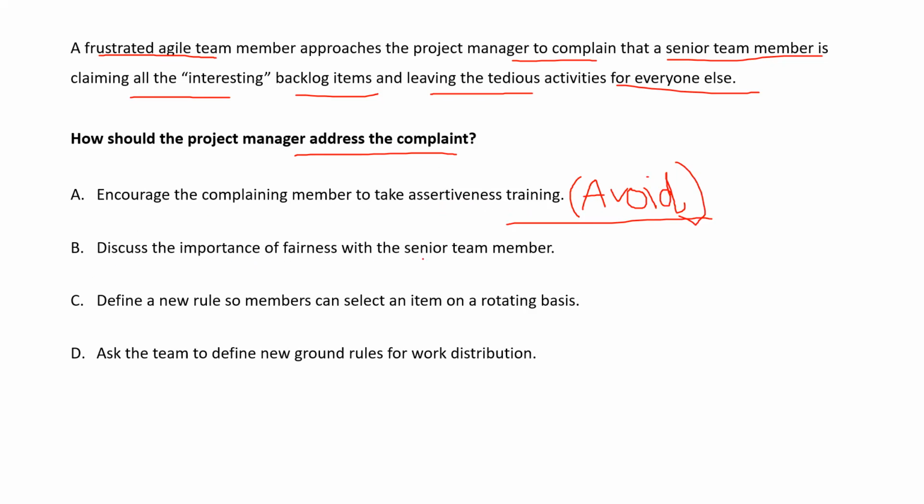Discuss the importance of fairness with the senior team member. Define a new rule. So, you will define the rule? You define the rule or the team? Team, right? So, you cannot define it. Ask the team to define a new rule for work distribution. Team is the better option. Correct. Great. So I hope you guys have learned something again.